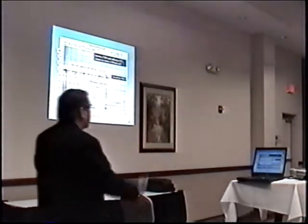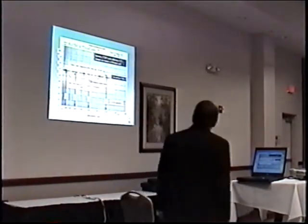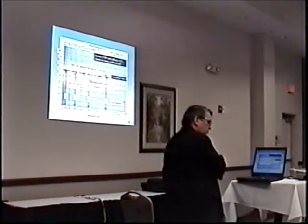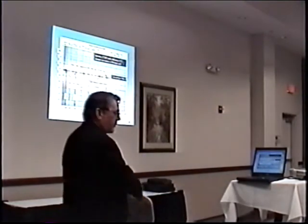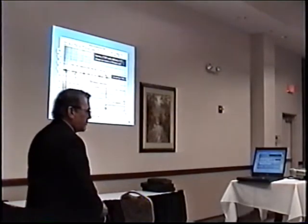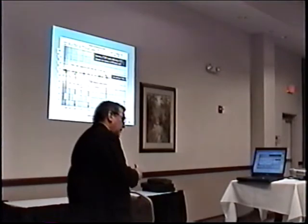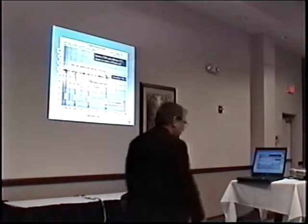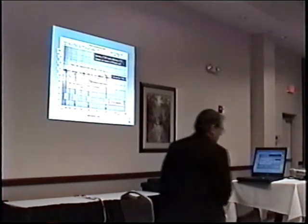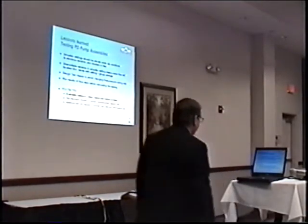So then the pump rep says to me, oh, did you know, we set those unloaders under flowing conditions. It's completely different under non-flowing conditions. And of course, we're testing when we fill the system under non-flowing conditions. And I said, well, how come we're 3 years down the road and you didn't tell me that before? You know, so I'm still going through a tremendous learning curve with these things. And I'm a little ticked off about that. As far as I'm concerned, there's no reason why that should have happened.